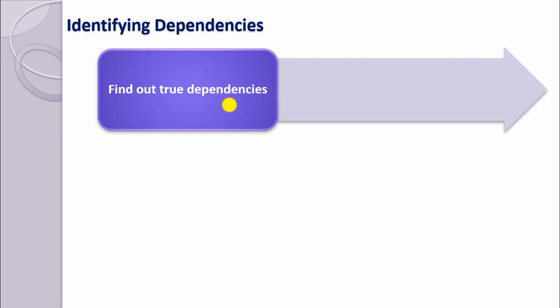It could be which deliverables depend on others, and also in a project, identifying dependencies includes external dependencies, like the other vendor or the third party you are dependent on. In some cases, the project organization depends on matrix kind of systems. For example, I was handling an insurance IT project, a huge project consisting of 50 to 100 members. But the main part of the project, the core team, actually it was an insurance product, was being built by some other team sitting in some other geographical location.